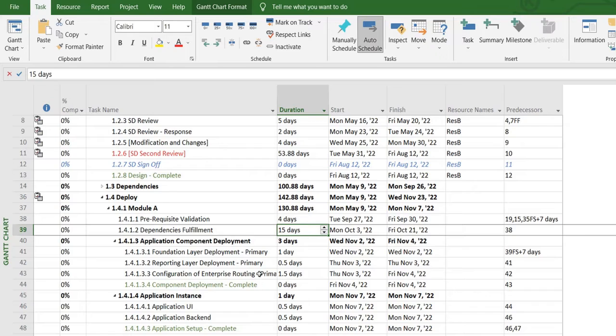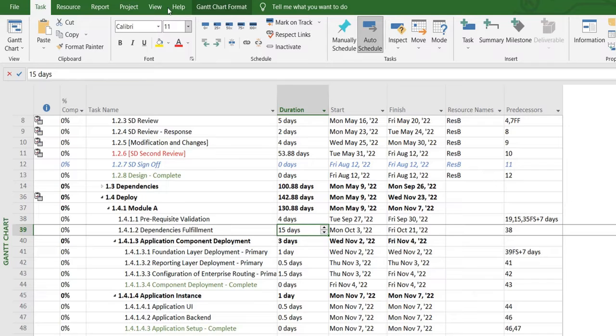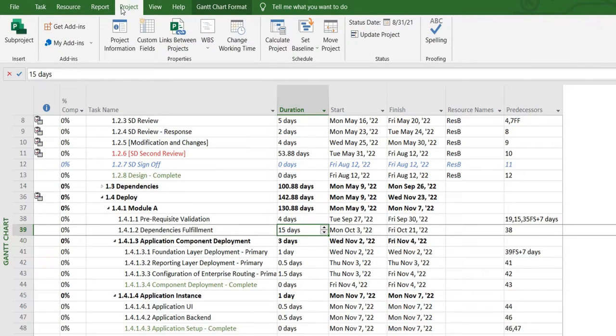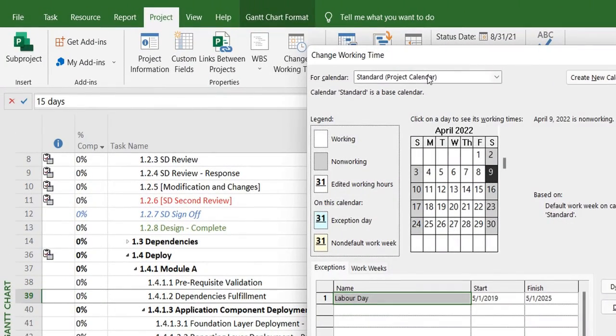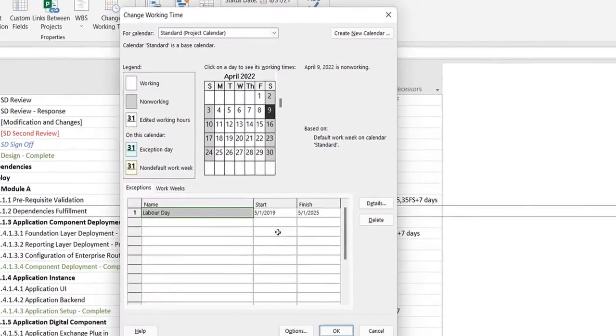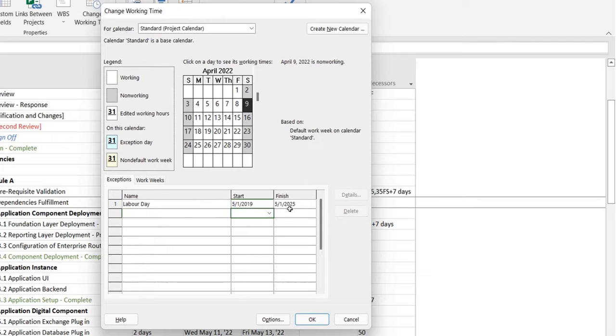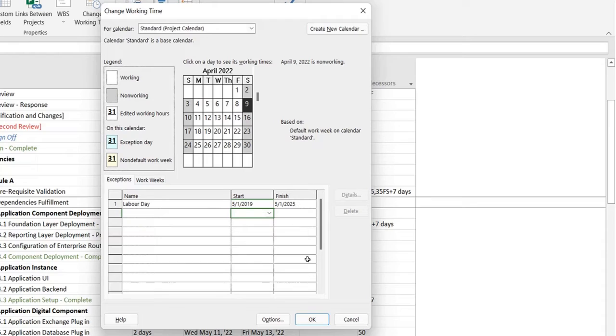By default, the calendar that's applied on the project plan is shown over here. If you head over to the project tab and select change work time, you can see that the standard project calendar is defined with the exception days or non-working days defined over here.